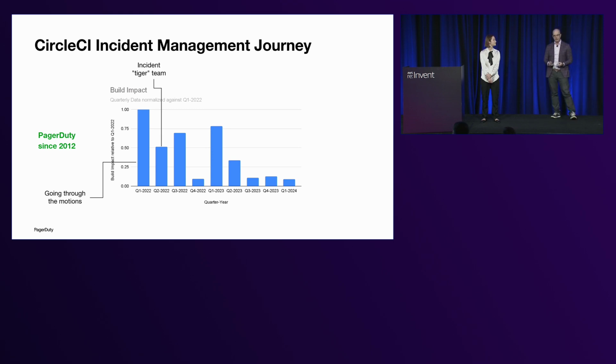And so in early Q2, I put together a Tiger team. I went to every incident for a year because I said, we've got to understand what's happening in these things, and just reading reports isn't getting me that information. We built the spreadsheet, which I believe every company has built: when did it start, when did it end, who was impacted, really trying to understand what was happening in all of those incidents, what was the component that changed, if it was a component, how did we find out that there was an incident.